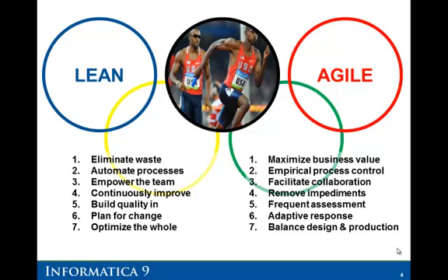We bring that from lean, and remove any impediments. So what's often referred to as the Scrum Master, if you use the Scrum approach to Agile, that person needs to remove impediments. Anything that is obstructing or distracting the team, that person needs to focus on. And sometimes this involves giving him the best tools and technology to get the job done efficiently and effectively.